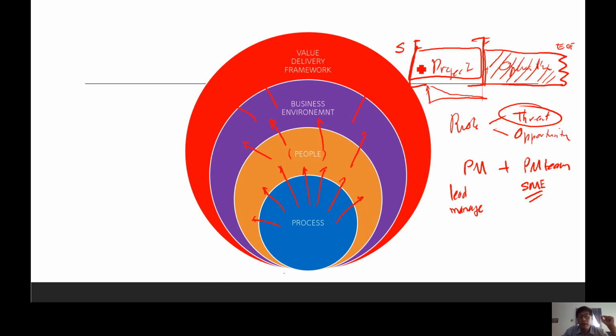So at the beginning of the project, the risk is the highest. The threat risk overall, I'm talking about overall, not just only commercial risk, not only just budgetary risk or schedule risk. I'm talking about generically, the threat risk is the highest at the beginning, right? And it draws to a minimum, or rather to zero at the point of handover.